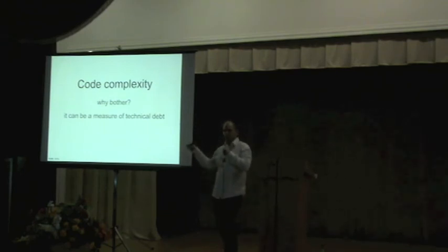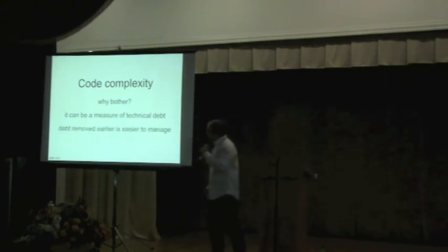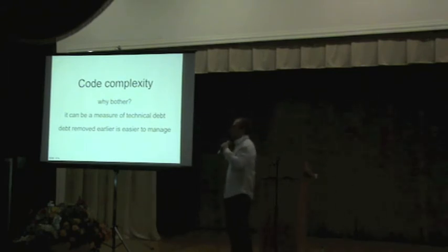How does it change over time? And you can detect that, for example, the client is pushing too hard for new features, so the complexity is growing. The team is not doing a very good job. So you have to step in and say, sorry, client, we have to do some refactoring because we will suffer in the future. Yes, and obviously this is a measure of technical debt. Technical debt is a very bad thing. This is something that you're doing just to make this program work, and then we'll fix it later. You never fix it later unless you actually do the proper refactoring.